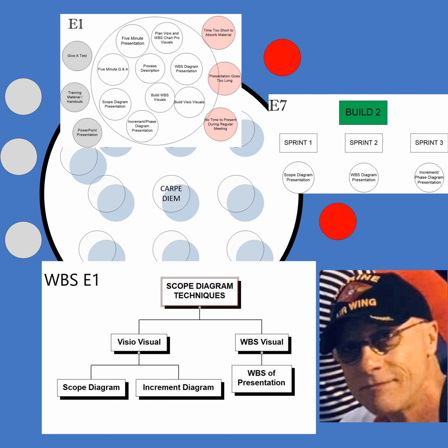Increment 5, excess equipment. Identify excess equipment, decommission equipment, dispose of excess equipment. Obviously, once you've vacated most of the current data center, then you start figuring out what you can do with the excess equipment. And I still put down here out of scope: tech refresh, beachhead equipment, upgrade circuit, application ATOs, authority to operate, network upgrade, server upgrade, OS upgrade, RAM upgrade.